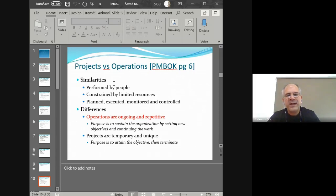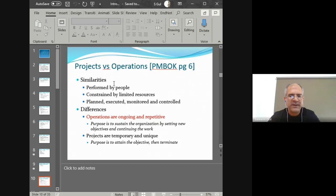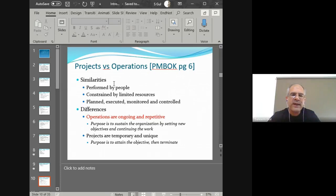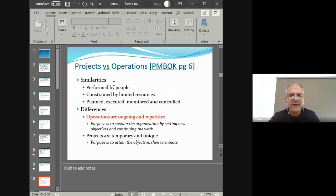Both projects and operations are planned, executed, monitored, and controlled — so that's not unique to a project only. Now the key difference is that operations are ongoing and repetitive. Once you have an operation, you keep doing it every day — the same thing over and over — and the reason is to sustain the organization.